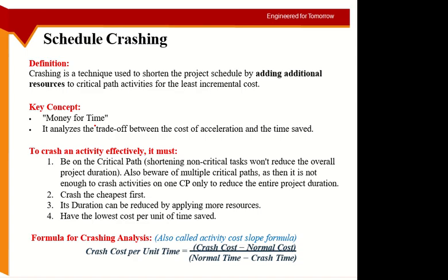One thing. When we were discussing this, I believe it was Hussein who asked whether we can have more than one critical path. Yes, we can. I said at that time as well, it is possible, but it is very difficult to handle, because anything which happens on the activities on any of the critical paths will disturb your project. So when you are doing schedule crashing, you have to do it on both the critical paths to have the effect.